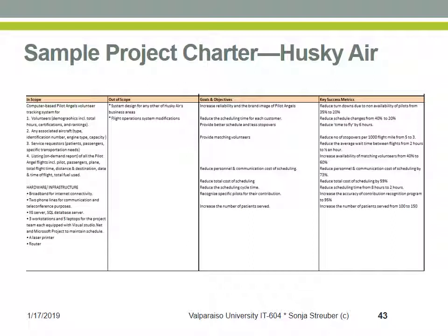in the project, where someone may come to you and say, you know, when you signed up for that piece of scope, you also signed up for XYZ, which in fact you didn't. If you mention XYZ in the out of scope section explicitly at the beginning of the project and the project charter, then that is a great communication vehicle to say, you know what, we decided that that would not be part of the project this time around.